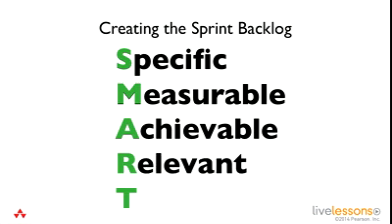It needs to be relevant. Sometimes people want to put tasks on there to justify their existence. I had to go work on this for this planning meeting for something outside of our sprint goal. That doesn't need to be a task on your backlog. That actually might show up as an impediment to doing your actual goals. So make sure it is relevant to the actual product backlog item that you're working on.